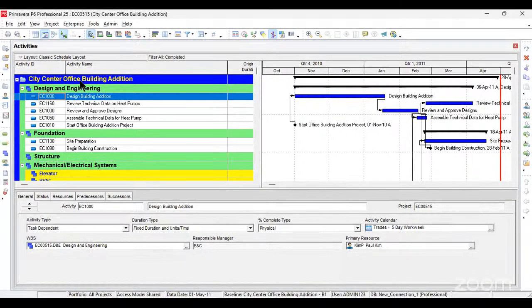In order for you to start a project, you need to create a new file. In order for you to create a file, the first thing you need to do is to create your enterprise project structure. In our previous class, I said REnT Limited, we might have different projects going on in different areas of River State or Nigeria.